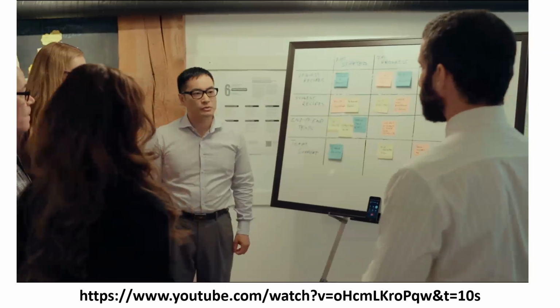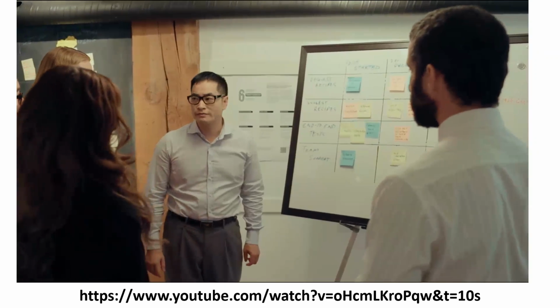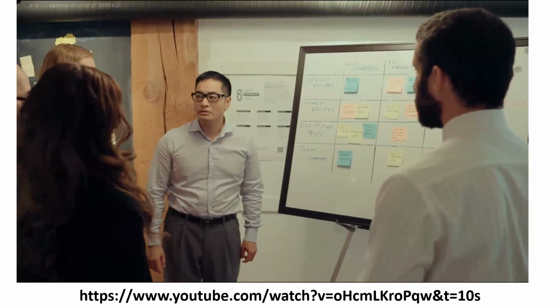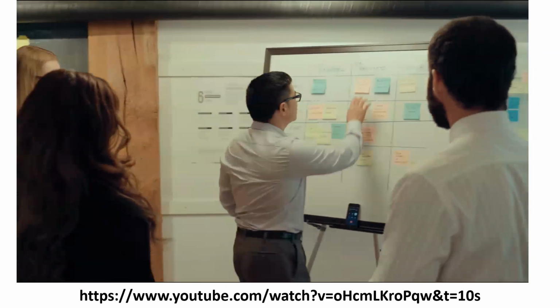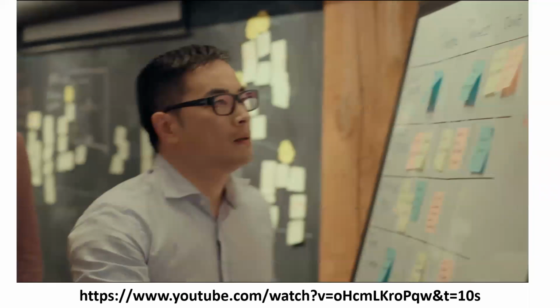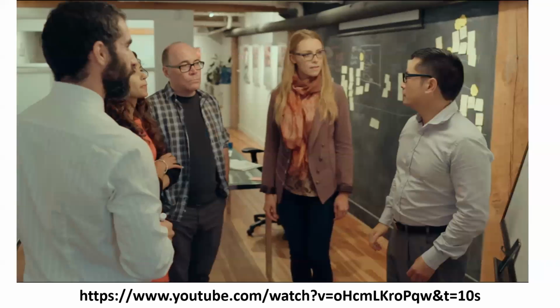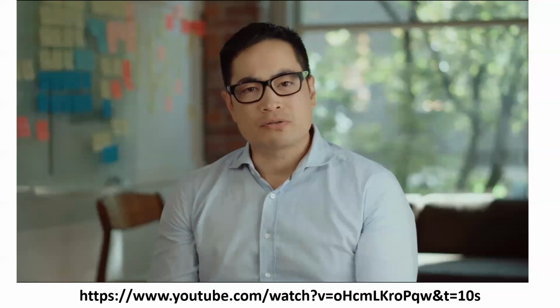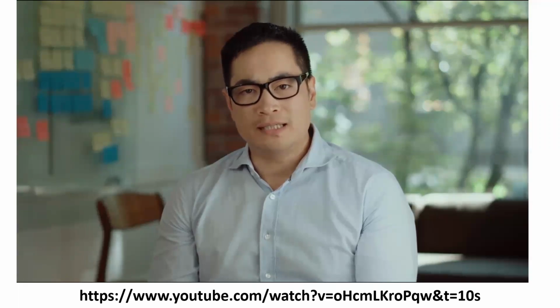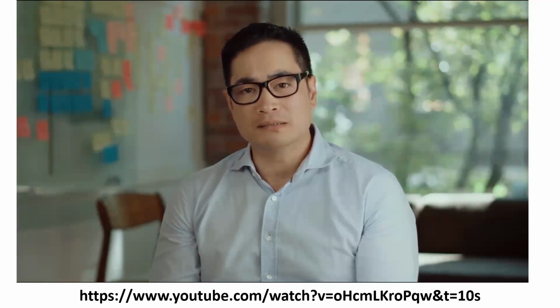Yesterday, I finished the source code for the recipe request voice interface, and I ran the unit test, so that's done. But these stand-ups are okay. You only have to answer 3 questions. What did you do yesterday? What are you doing today? And what is your main impediment?